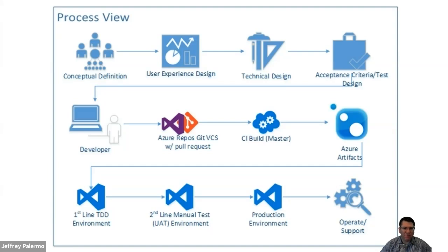what I would call the development cycle with acceptance test criteria, test design, whereas this is the definition of done. For people using Scrum, that Scrum definition of done. And before we actually type out the code, this is the team's shared understanding of what the heck we're doing here, and just, hey, how are we going to test this thing? If I was to have it done right now, what sequence of buttons would you click, and what would you do that someone else on the team would say, oh yeah, it's done. That's right. Acceptance criteria, test.